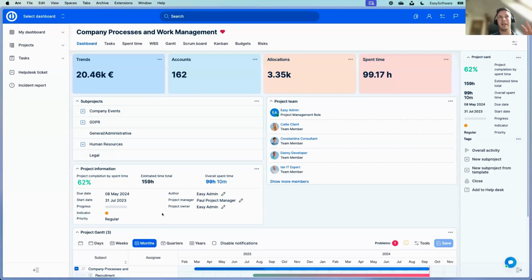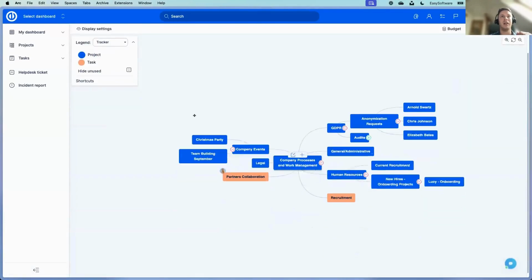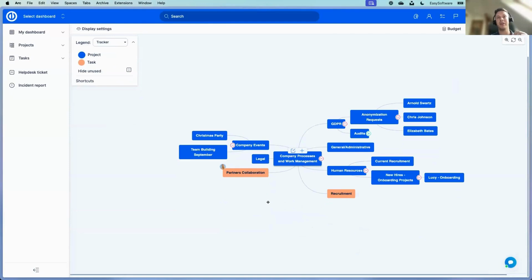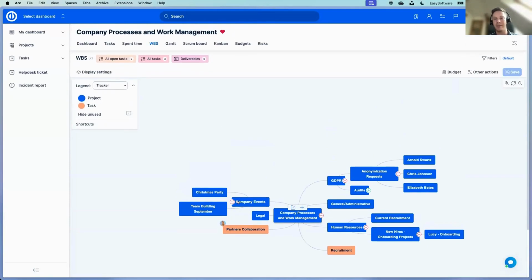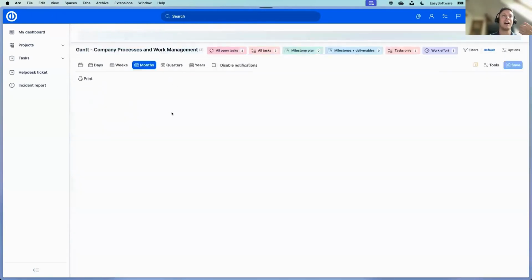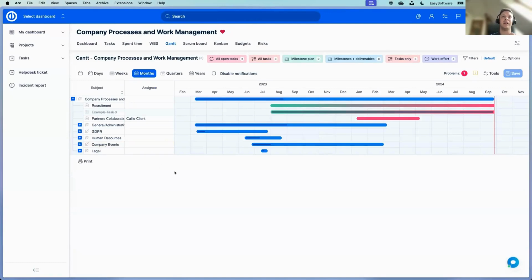There's also going to create some other tabs, including, for example, risks and some project management methodology that you can choose. That kind of tab is going to be created with that kind of info. And it's also going to create a work breakdown structure. So it's going to create a hierarchy of tasks already here in WBS, which then you can, of course, fine tune and edit as you like. These tasks will have start and end dates already, so that you will have already a Gantt chart available as well. So that's AI Project Planner.